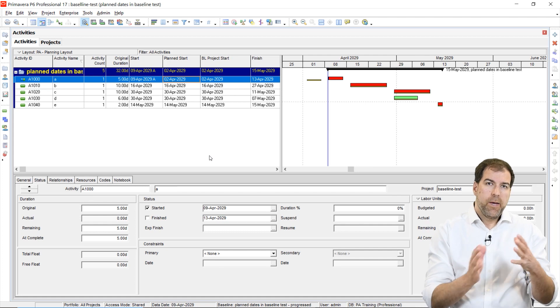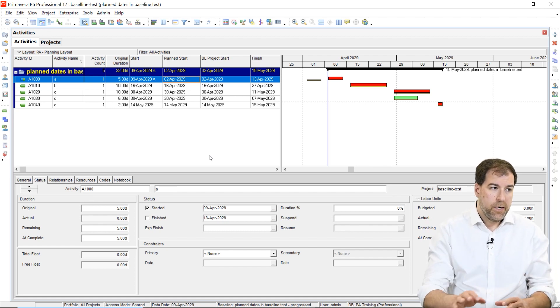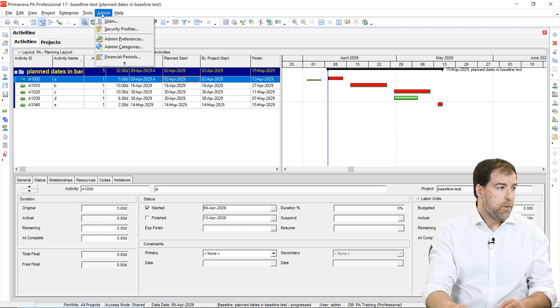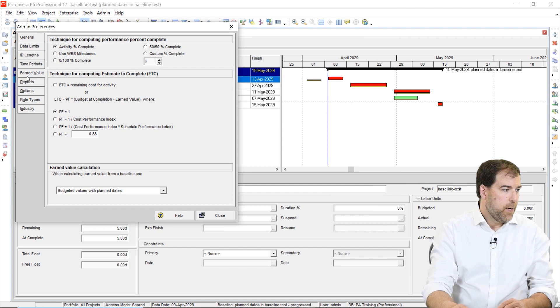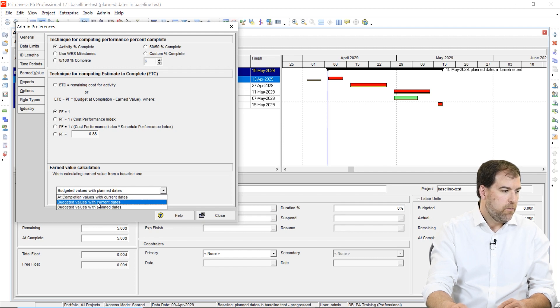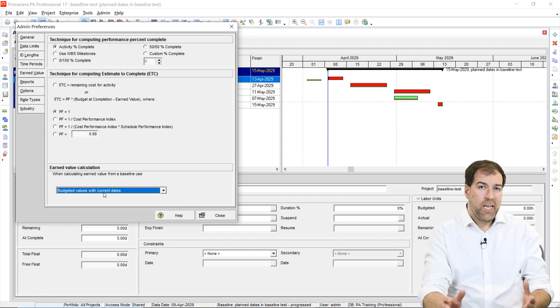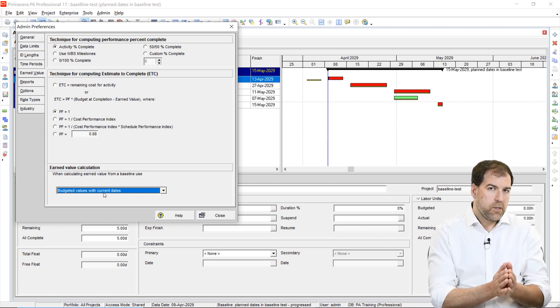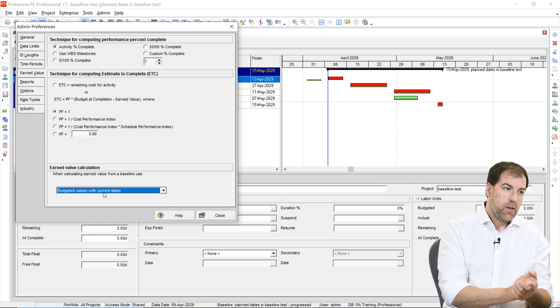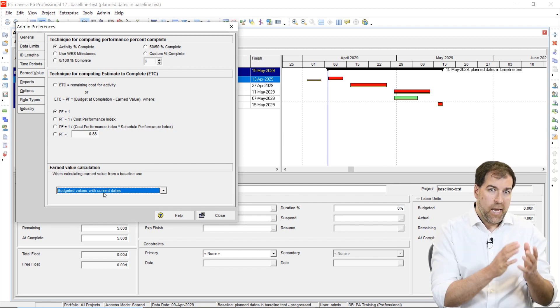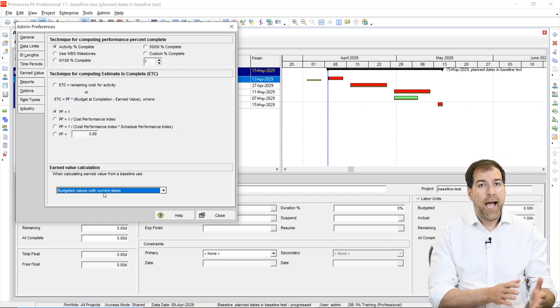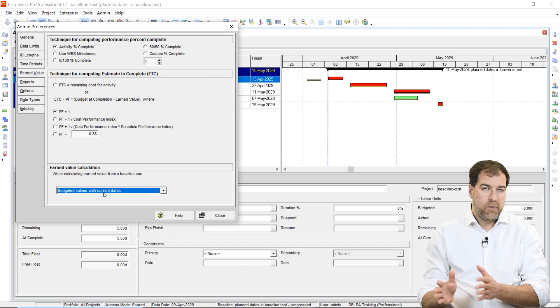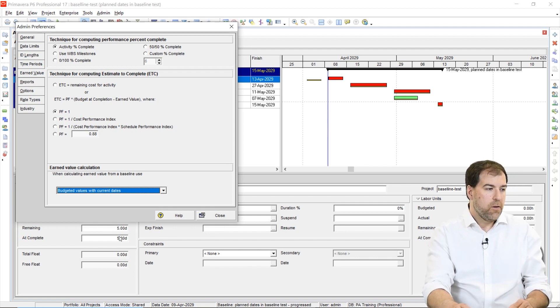So let's come back to our earned value setting now and how we should set it. And I want to show you what happens when we change the value. So we go to admin preferences and we go back to our earned value tab. And now we change this to, instead of budgeted values with planned dates, let's change it to budgeted values with current dates. And in fact, I don't like the name of that current dates because what we're actually talking about is displaying the actual dates. Because that activity actually started a week late, I would like the baseline to represent that actual start. It's not doing that. It's displaying the planned start. So let's see the difference.